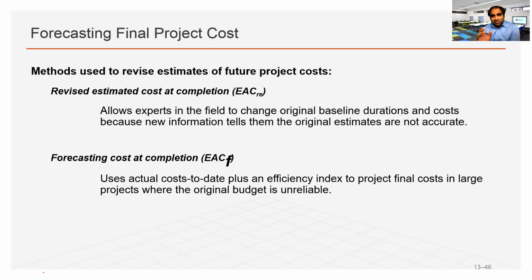Once the SV and CV are negative, we should be looking immediately. We should refine the budget, so the estimated cost at completion.